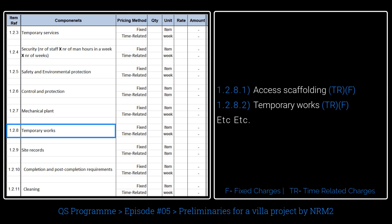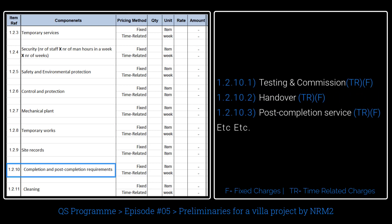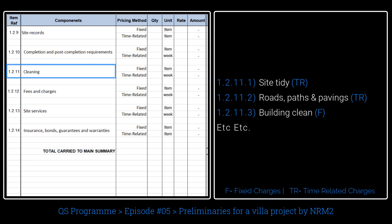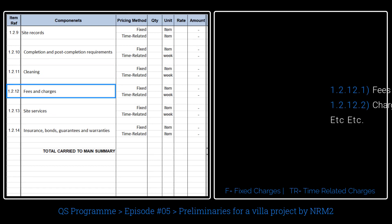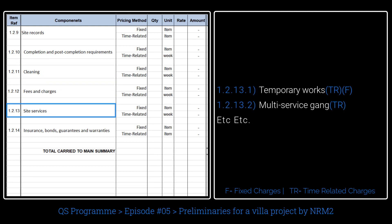Mechanical plant includes tower cranes and mobile cranes, etc. Temporary works cover dismantling and removing from site. Site records include camera purchasing, printing, and photography, etc. Completion and post-completion requirements include testing and commissioning plans, handover, post-completion services, cleaning, and maintenance of roads, paths, and paving, etc. Fees and charges are fixed and time-related costs. Temporary works not specific to an element can be fixed or time-related charges.